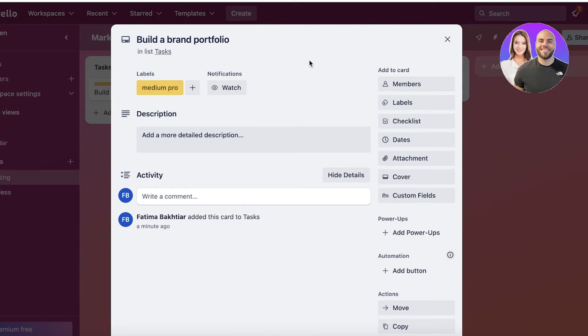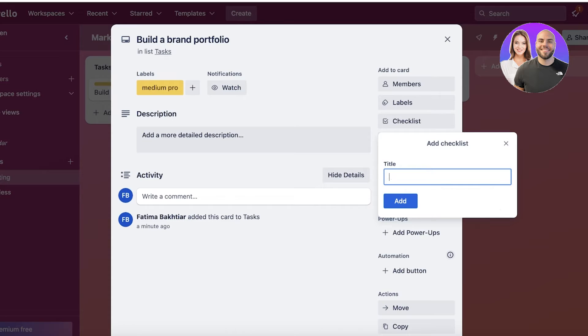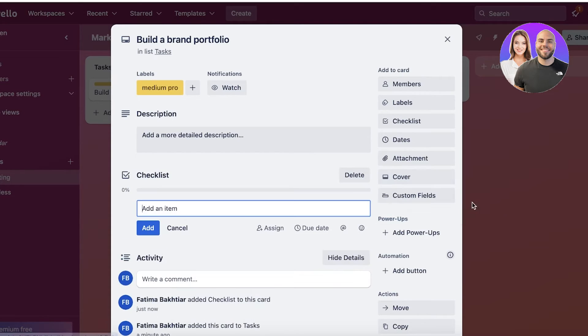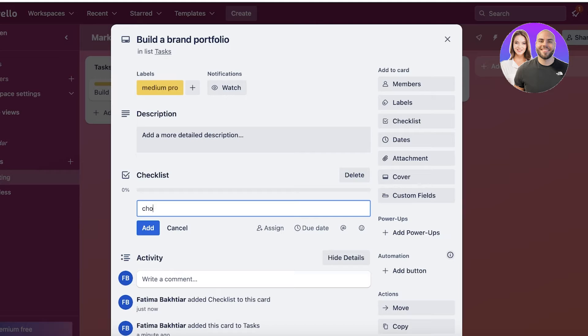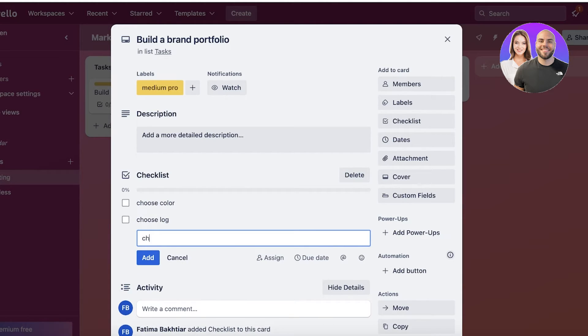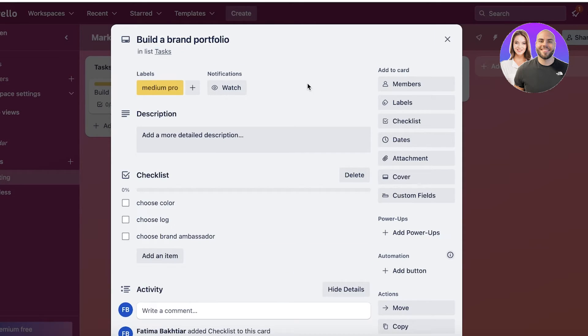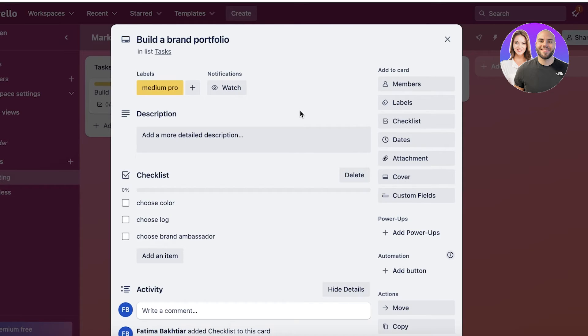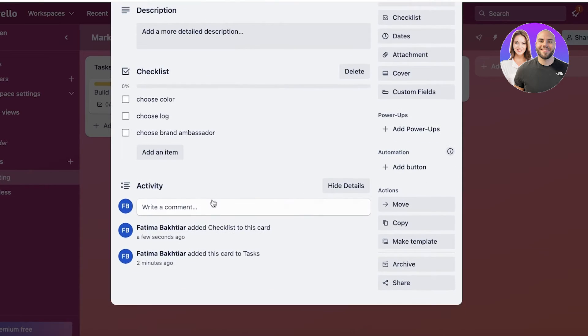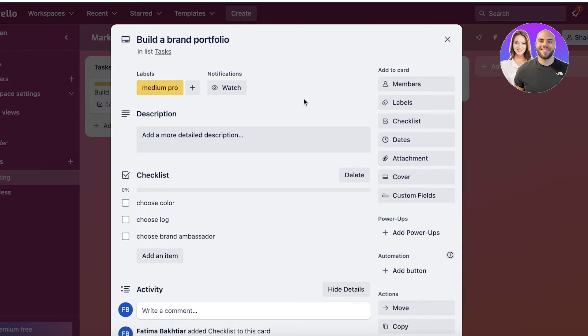You also have a checklist that you can build. You can enter a checklist or subtask. Let's say this is going to be Checklist, and then you can add items within that. These can be subtasks. For our Brand Portfolio: Choose Colors, Use Logo, Choose Brand Ambassador. You can add multiple different things that you might have to do under a larger task because obviously tasks have multiple different steps.